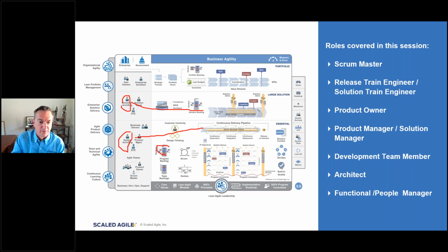And they are looking to the roadmaps and ensuring that the backlog items build out the proper architecture infrastructure, and they've got enough items to go to the experimentation, design alternatives, risk mitigation activities for the solutions that these value streams are building. An epic owner is up here inside the portfolio. So these are initiatives that might span multiple agile release trains. Now, an epic owner is really responsible for shepherding that across within one value stream, or typically across multiple value streams.